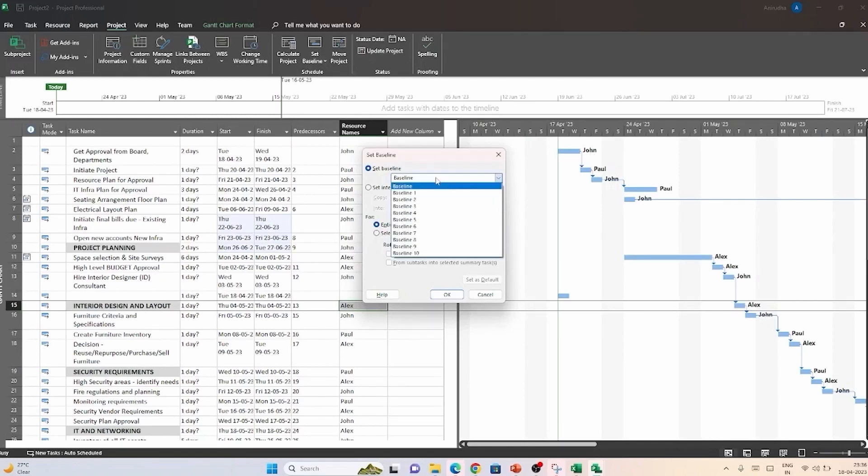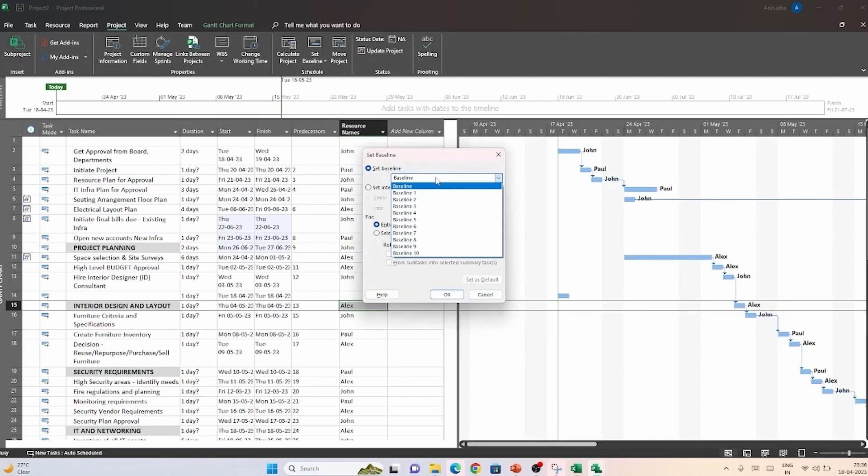Baseline 1 through baseline 10. This means that you can have up to 11 baselines simultaneously for your project. And 11 baselines should suffice for even the most complicated project schedules. But for now, we are only creating the very first baseline in the launch of the project. So, we will just retain the default name baseline.